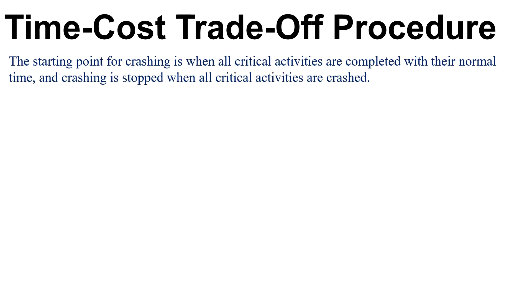In this lecture, we are going to discuss the time cost trade-off procedure, that is the procedure for crashing of a project. The starting point for crashing is when all the critical activities are completed with their normal time, and crashing is stopped when all the critical activities are crashed.